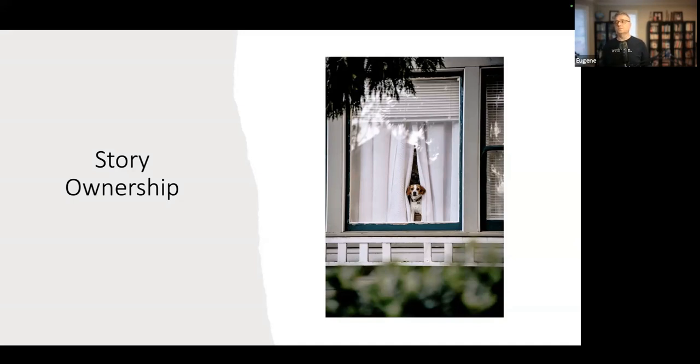What that might mean is they will help assign tasks to other developers that are swarming on the story. They might make adjustments to the story if adjustments are needed, and so on and so forth. They're basically making sure that the story is appropriately saturated so that it's being worked on and getting through to the end. What happens at the end of the year in performance reviews is we talk about people's performance as story owners, right? They've driven story A, B, C to conclusion. And that is the way that they're basically evaluated.